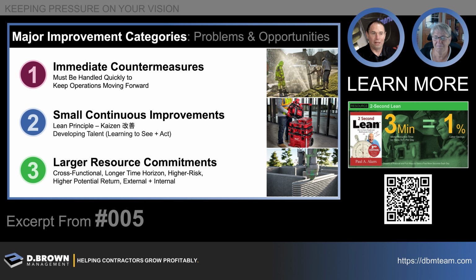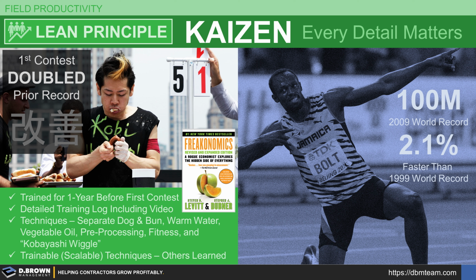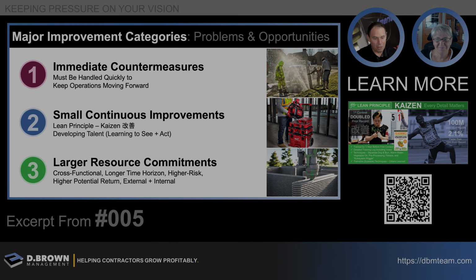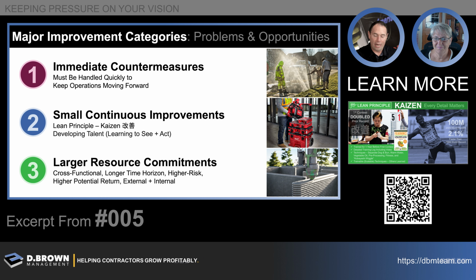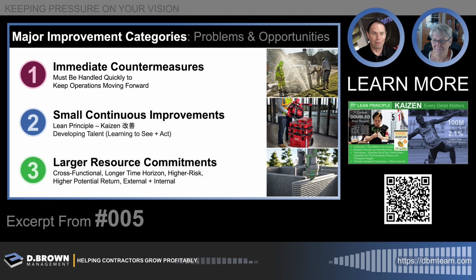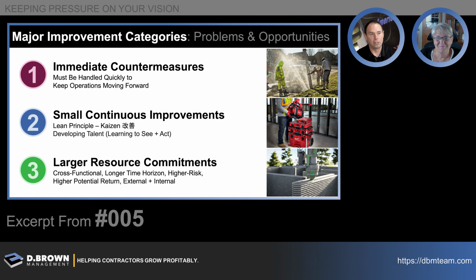That's huge. I've talked about it before. One of the earliest things I remember really clicking with how important those time studies were was reading something in Equipment Today magazine, probably in '96, '97. It was about increasing the yield by half a yard per load by using spray-on bed liner on the haul trucks. In the article, it had the project engineer or field engineer that identified it, with all the math and calculations. It was a really simple article, and you go, okay, that's pretty cool, but half a yard at a time, when you're doing thousands of them, adds up really quickly. So small continuous improvements always have to happen.